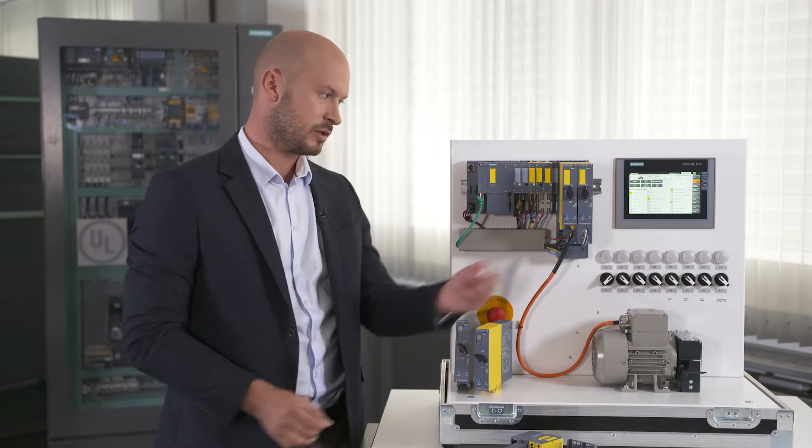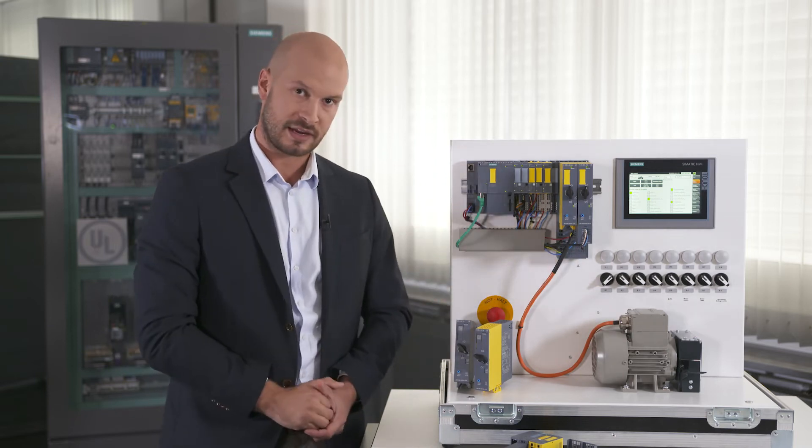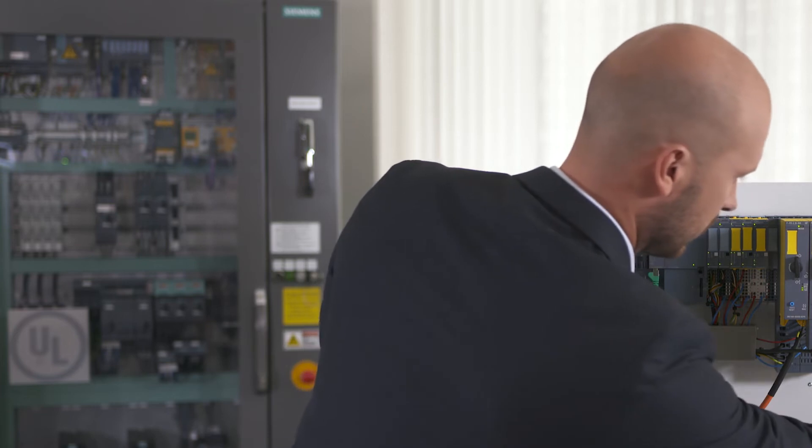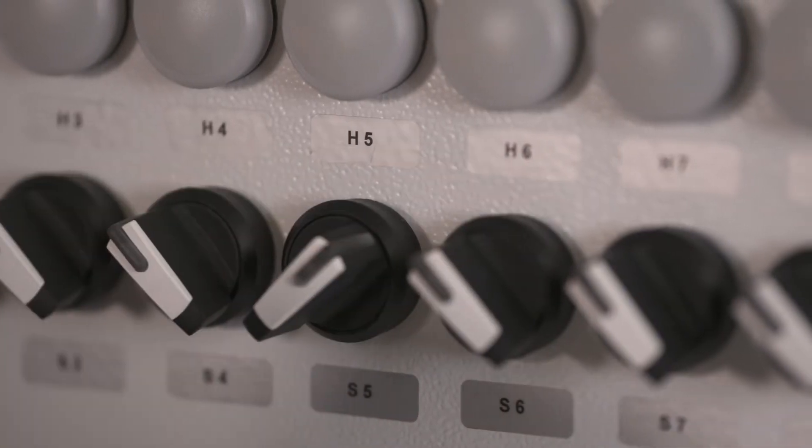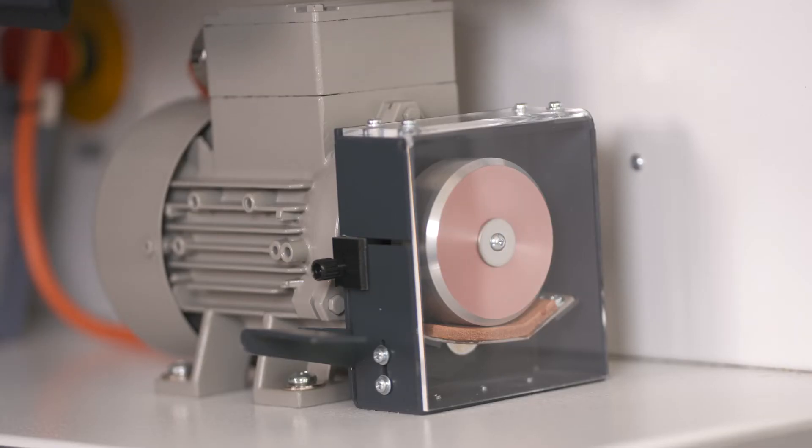For instance, during commissioning you can test clockwise and counterclockwise rotation via the inputs. You can do that here for example. I'll activate local control here. Turn the motor clockwise and then counterclockwise.